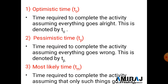Pessimistic time (tp) is the time required to complete the activity assuming everything goes wrong. For example, if excavation was planned for three days but takes five or seven days, that is the pessimistic time. It is denoted by tp, where 'p' means pessimistic and 't' means time.